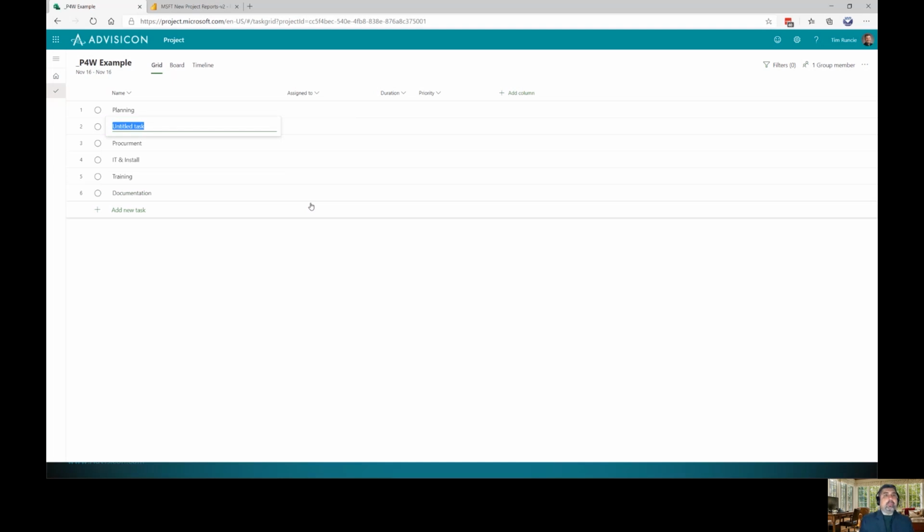One of the things that we might plan is map out resources, right? Now, I want to indent this in. This is referred to as making a subtask, or I could just press the Tab key as I move through my columns, or Shift+Tab. The overall idea is that I can promote and demote these, and I can also see that I've got some activities.